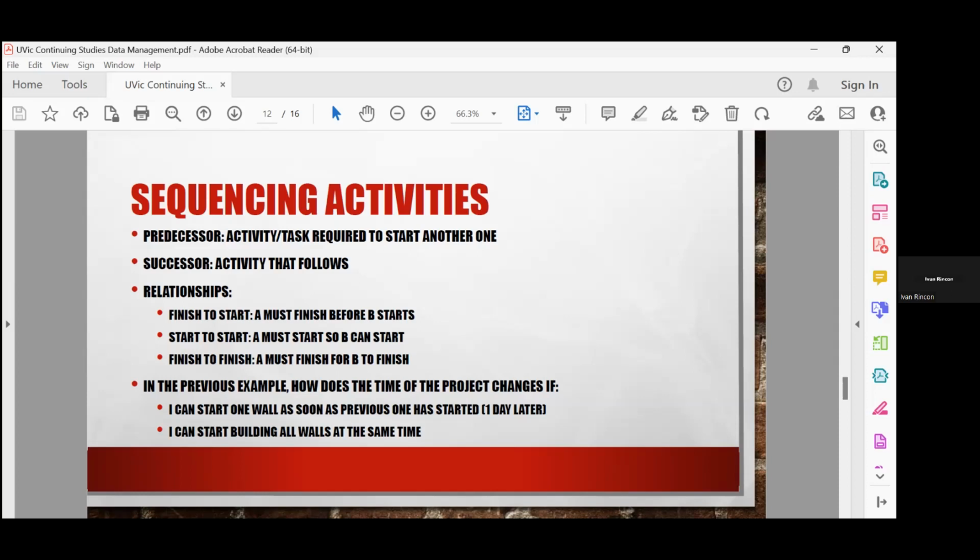Was that plan logical? No, because of course, you have a 100 million record database. It's not going to take 1 day to extract information, right? It's going to take probably a month, 2 months, 3 months, 5 months, like in this case. So you have to deal with those constraints, right? So that sequencing is based on those conditions that you may have in your particular project.